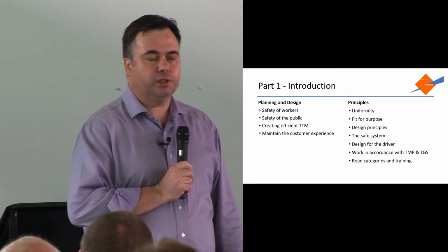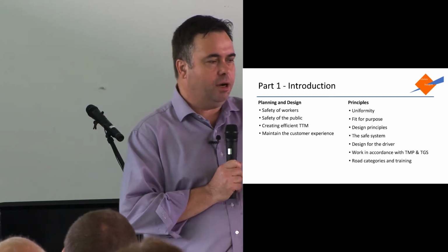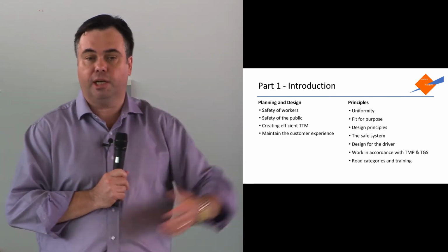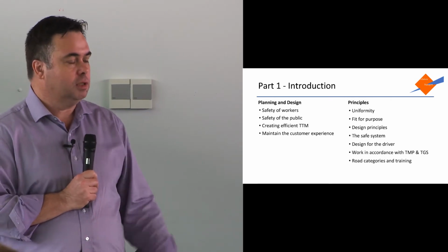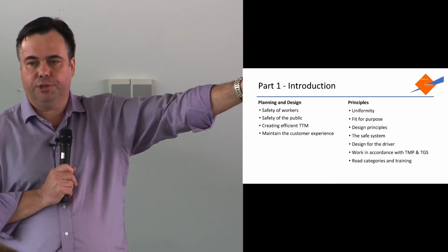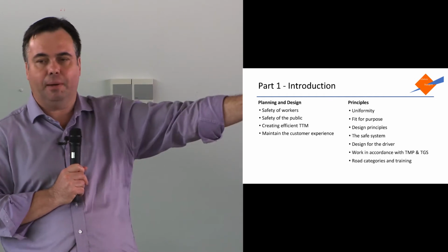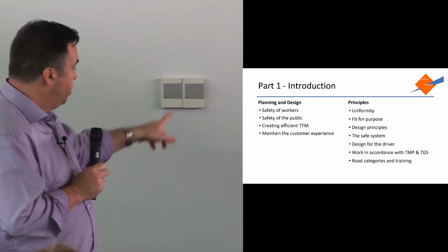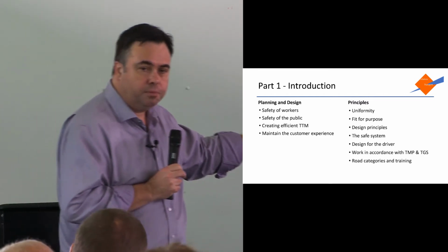There's too many sites that you see that, well, we're going to be here over the next six months from here to here, so let's just set it up all the way from start to finish right now. There's no one actually going to be in that last 5 kilometres of job for the next 3 months, but let's set it up. No, keep it short, keep it tight, keep it efficient. Because it's about the customer experience.